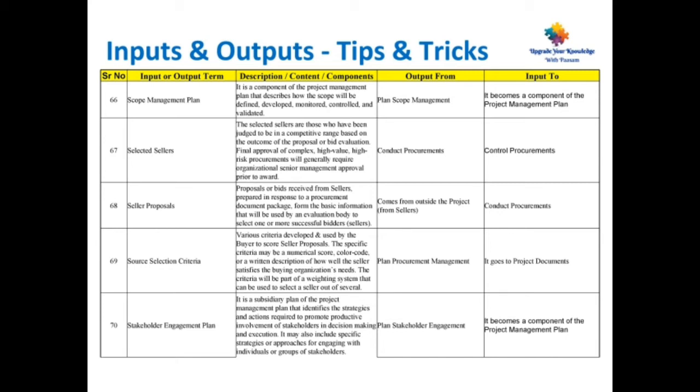Point number 68, sellers proposals. Proposals or bids received from sellers, prepared in response to a procurement document package, form the basic information that will be used by an evaluation body to select one or more successful bidders, that is sellers. This output comes from the sellers, which is outside the organization. It goes as input to conduct procurements.